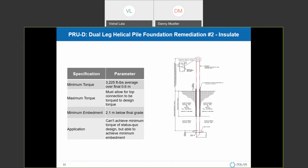In most cases, if it was a larger site, we would do a geotechnical test and know this in advance, and we wouldn't want to build a huge site, 500 kilowatt, 2 megawatt, 10 megawatt, where we were insulating all the piles. But in these types of projects, where you have 8 piles, or even 28 or 30 piles, it's not something you want to do, but it doesn't break the bank, and it's not the worst thing at the end of the day. Compared to what you would have spent to get the fully engineered package, you still end up ahead of the game.